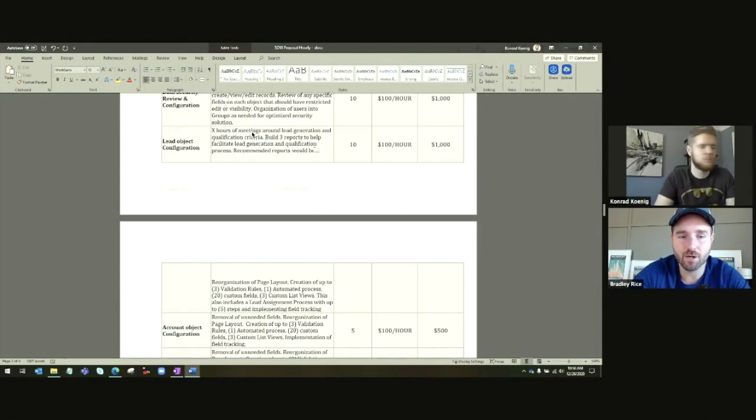So you want to be able to come back to this and say, hey, we did spend 2 hours talking about lead generation and qualification. That was those 2 meetings with those 2 groups. We did build 3 reports. They're right here. And I actually added them to a dashboard, which wasn't part of the statement of work, and put them on your homepage for you so that you could make business decisions based on those.